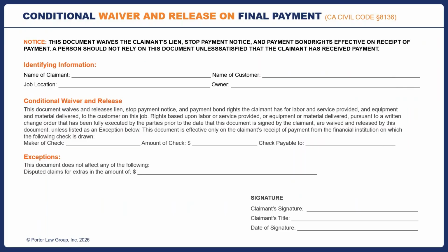That's what you could put there. That means you would release everything for the amount of the check, and you would still have this one issue down here that is yet to resolve. So you don't release anything as to that. If the check is truly your final check and you don't have any issues in dispute, then you probably want to put down there where the dollar sign is just a 0 or ZERO, and let it go at that. And then that may be the end.